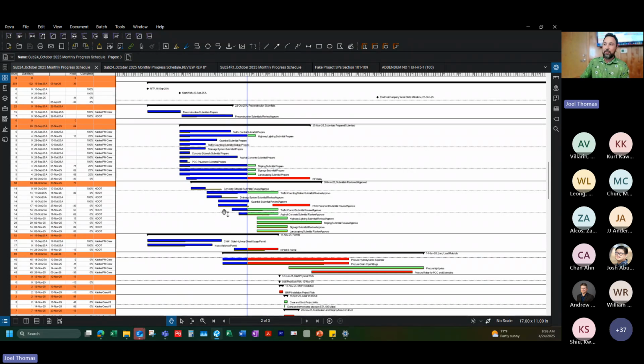That's basically showing you all the connection ties to all the activities themselves, how they're tied together. That's what all those lines are. So I usually ask contractors to also turn that off when they submit this, and it just makes it a little easier to read and understand.